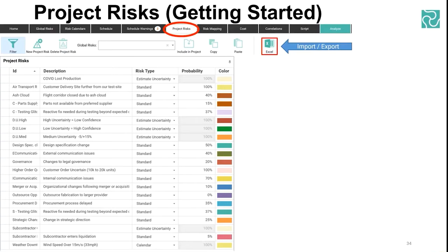Otherwise, the risk register will remain saved inside the database as you last left it. So if it was a month ago you last ran your Monte Carlo, then the risk register in ARM, say, if you're using a product like that, will have updated over time, whereas this will still be showing what it was the last time you ran a Monte Carlo simulation in this product. This database won't have changed. So that's the interface you might consider. Otherwise, you're just doing it manually via the normal mechanism.